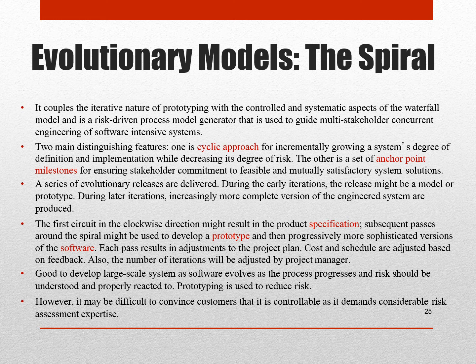A series of evolutionary releases are delivered during early iterations; the release might be a model or prototype. During later iterations, increasingly more complete versions of the engineered system are produced. The first circuit in the clockwise direction might result in the product specification. Subsequent passes around the spiral might develop a prototype and then progressively more sophisticated versions of the software. Each pass results in adjustments to the project plan, and cost and schedule are adjusted based on feedback. The number of iterations will also be adjusted by the project manager.